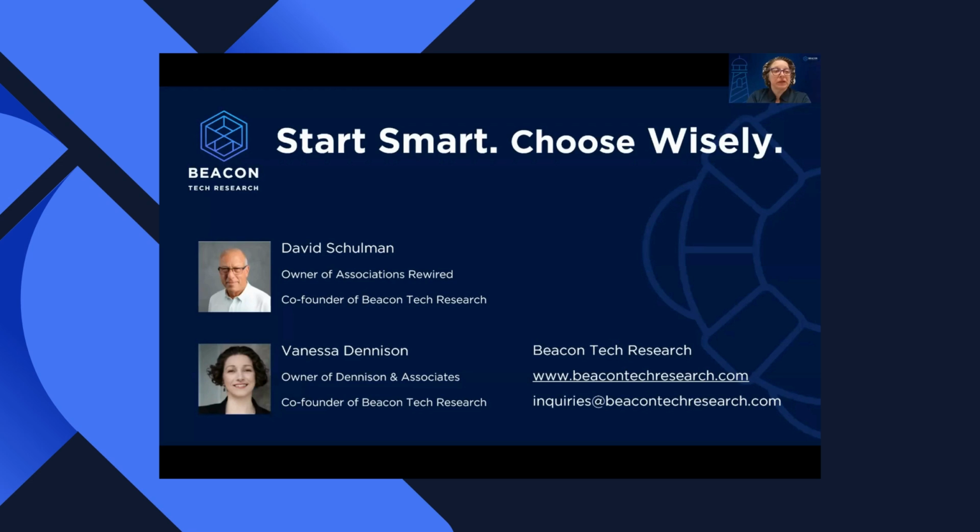And the testing is something that I find vendors do not provide a lot of support for. You're going to need to make sure that you're ready to create some test scripts. Again, scripting, there's that word, where you're actually laying out here are our processes, and you can use your requirements to drive this, your original requirements.